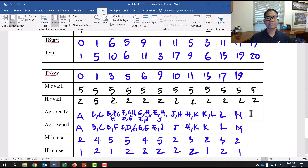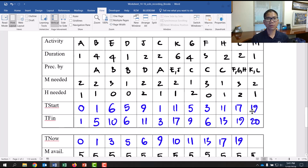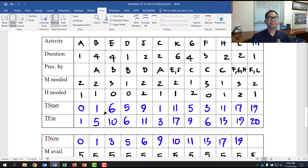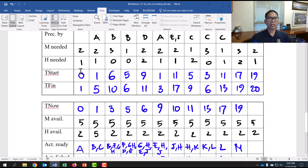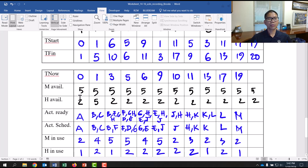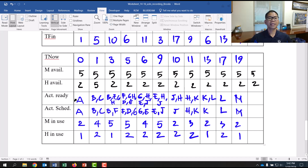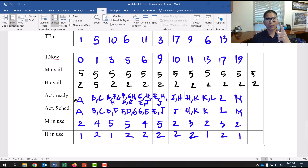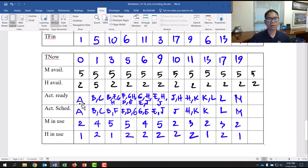Now the blue section is a little tricky — focus carefully. Once you understand one or two iterations, you can repeat the same pattern for the rest. Time always starts at zero, so 'time now' in the first column is zero. Go down to see what activity is ready: only Activity A, since A has no predecessor. You only have one choice, so you schedule A immediately at time zero.